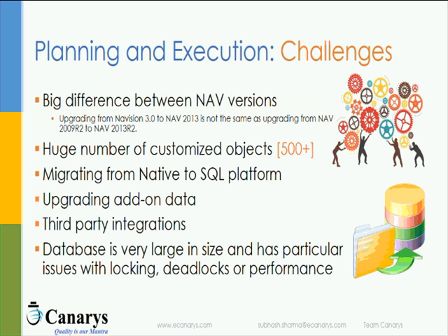Also, code changes done during customization without inline comments make the job more difficult for a developer. It is quite obvious that if someone has done a customization without making any inline comment, it's very difficult for us to understand whether this is custom code or NAV standard code. Migrating from the NAV native database to the SQL platform is again a small challenge, because we need to clean the bad data stored in the native database. Otherwise, SQL Server might not allow this to be integrated or migrated.